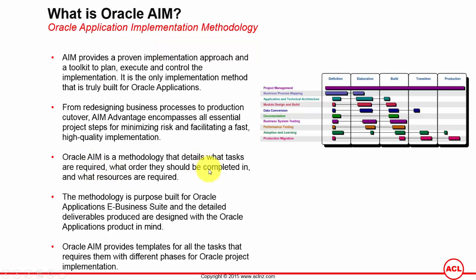Oracle AIM is a methodology that details what tasks are required, what order they should be completed in, and what resources are required. As shown in this diagram, it links to all the tasks executed in the definition phase under each of the processes listed. For example, in the project management process under definition, a task could be to define a project plan. Under the business process mapping process in the definition phase, a task could be to identify the client's present requirements and document their present business process flows.